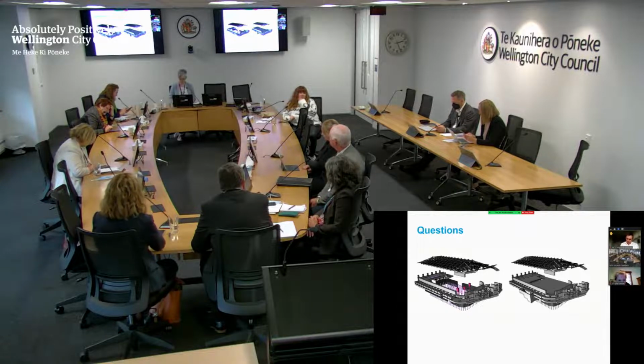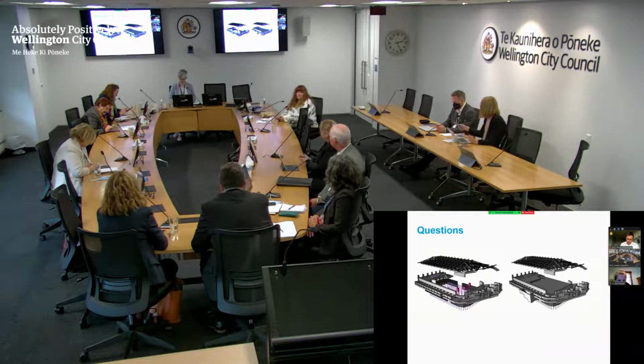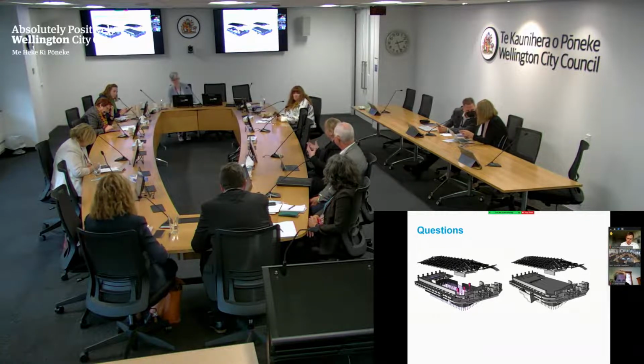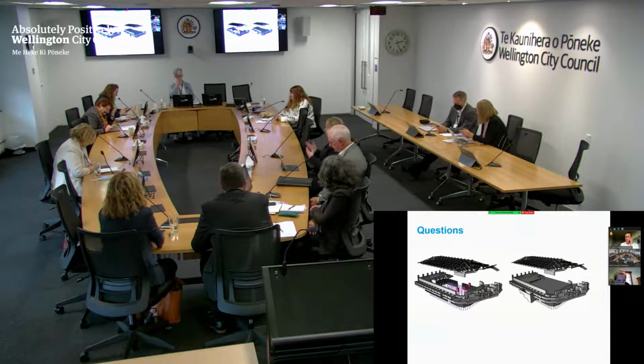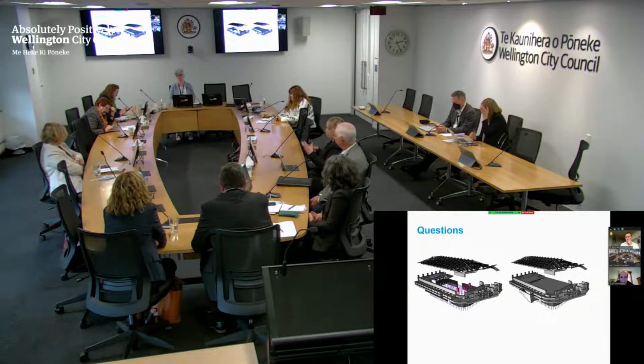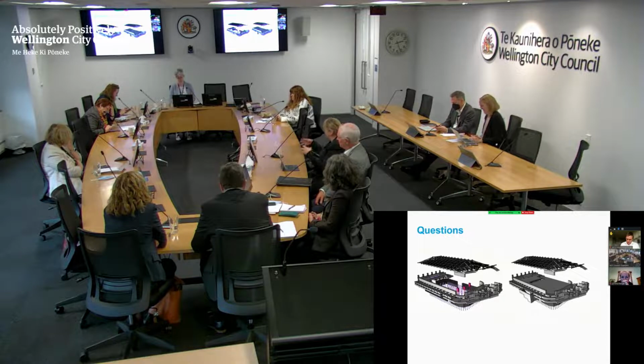It's a real issue. I think adding to that, if you talk about the supply chain, and we talk about it a lot, about affecting the market and this project, it isn't just the material supply chain, it's the supply of labour. We've had border closures where you'd normally have specialists coming in and out of the country. That's not been able to happen. It just puts more and more pressure on the resources domestically, and that's being felt market-wide. So there's so much constraint on the resources that are available out there.